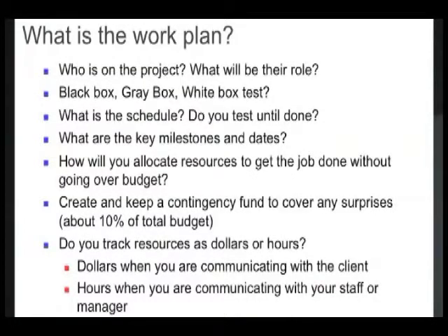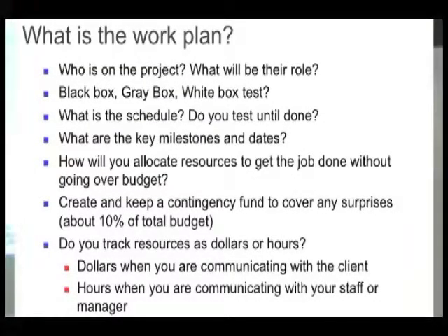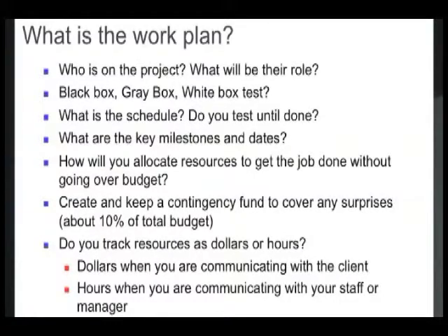What's the schedule? Do you test until done? Key milestones and dates, when you're going to meet, how often you're going to meet. How you allocate resources to get the job done without going over budget. We always got a budget on these things. Create and keep a contingency fund to cover any surprises. Track resources in dollars or hours. Dollars when you communicate with the client because they want to know dollars, euros, or pounds because, of course, this is international. Hours when you communicate with your staff.